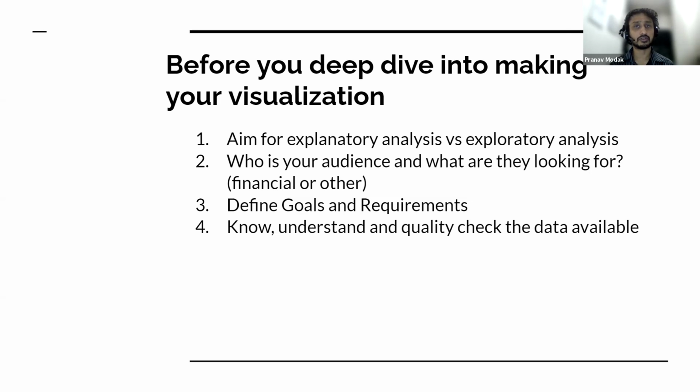Defining goals and requirements is pretty important, especially defining requirements, because a lot of times many people don't understand what they are even looking for. So you have to elicit requirements from them, like a typical business analysis. When I work with Bill on several Data for Good projects, he definitely makes it a point to gather the requirements from the key stakeholders, just to make sure that we don't get into scope creeps, we don't show information that is not necessary. And it definitely reduces the gap between what the stakeholders want and what you want to present, because many times what you want to present is definitely not what the stakeholders want to see.